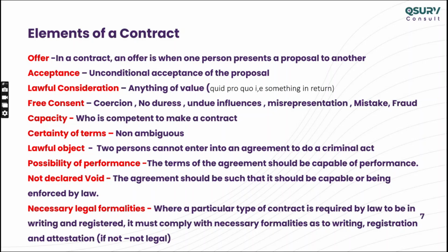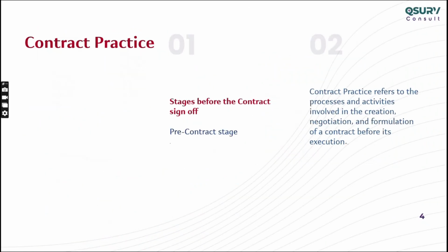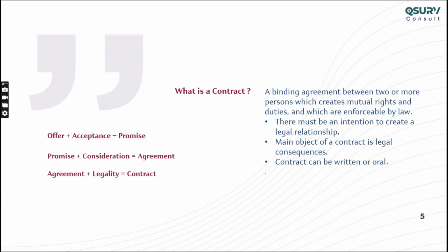Before you open the contract or go into the specification, terms, obligations and responsibilities, you have to ensure these points: offer, acceptance, lawful consideration. In my previous slide I explained that offer plus acceptance is promise, promise plus consideration is agreement, and agreement plus legality is contract.